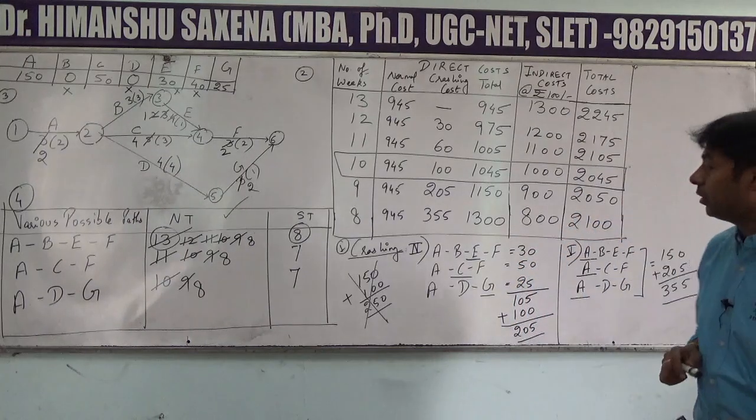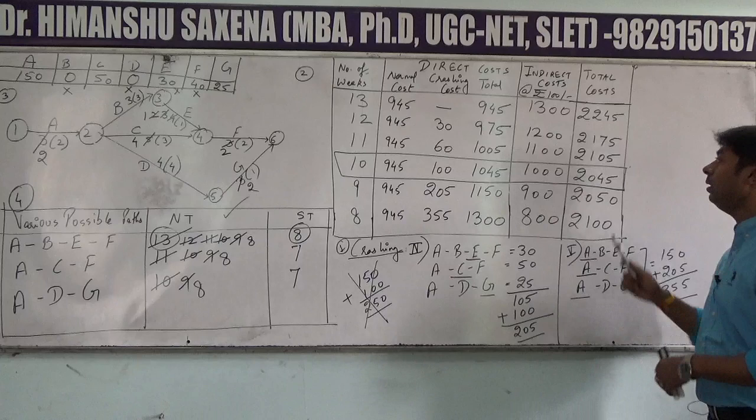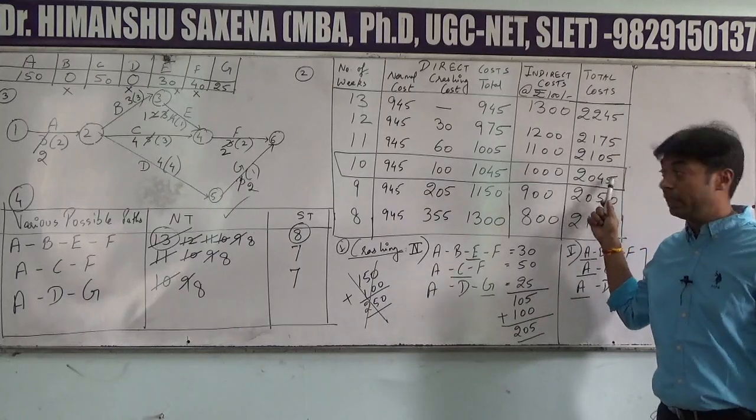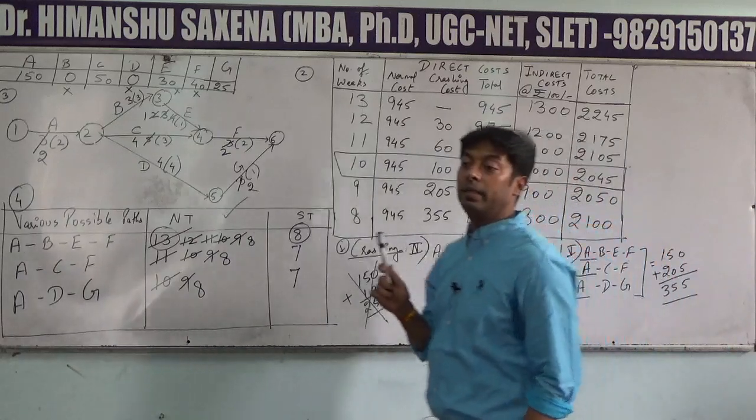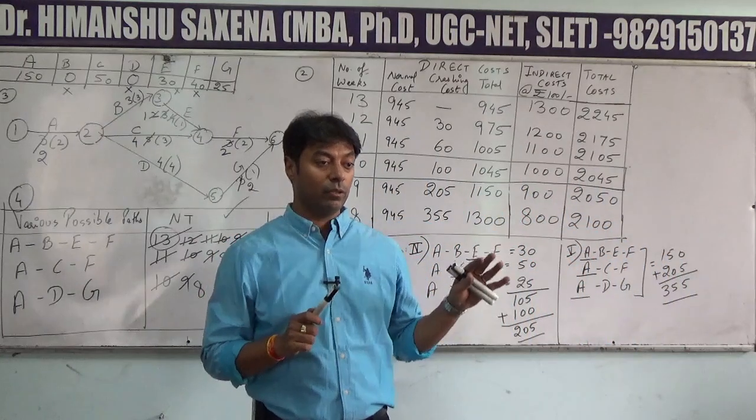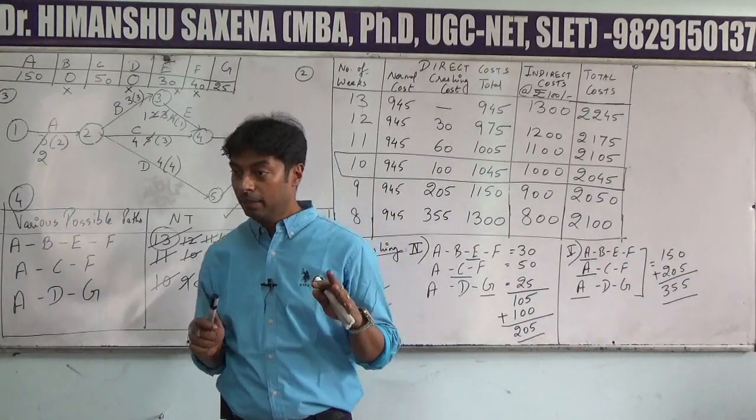That is, the suggestion which we have just given to the management, that since the total cost is minimum in the 10th week, therefore the project will be reduced up till 10th week only. Is it clear? Yes. Okay.